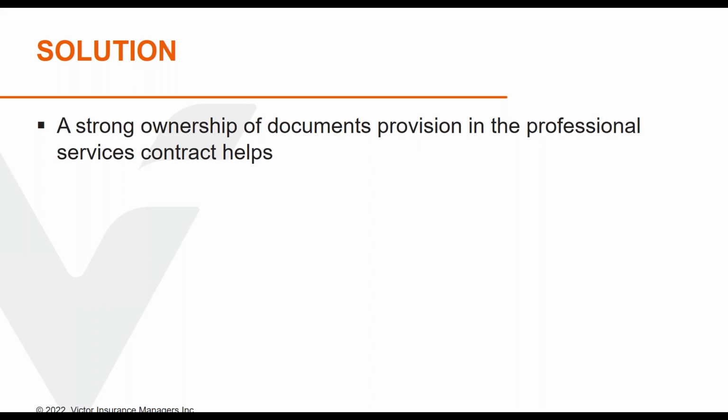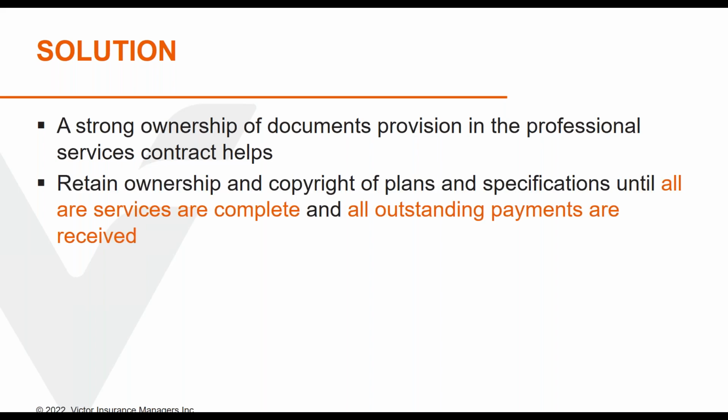because really what you have is a set of documents that you're providing to the client, the instruments of service. So you want to be able to say, hey, you know what? I have all of these rights to these instruments of service until all services are complete and all outstanding payments are received. So that is the type of position that would give you the ability to negotiate an appropriate addendum to your contract